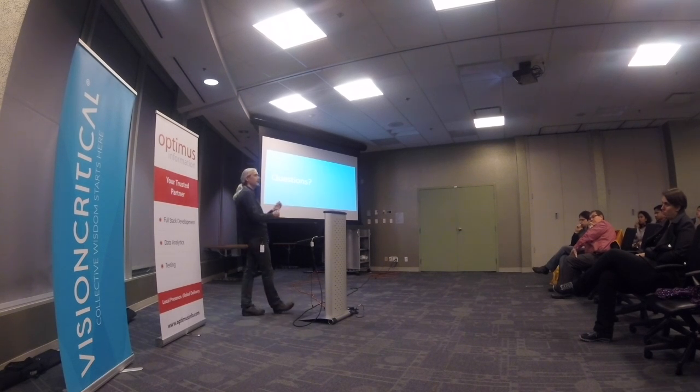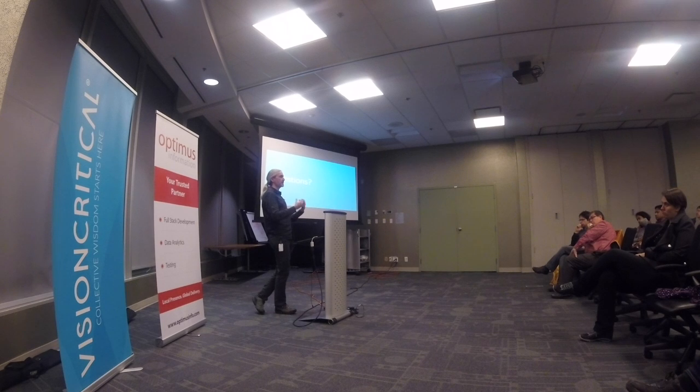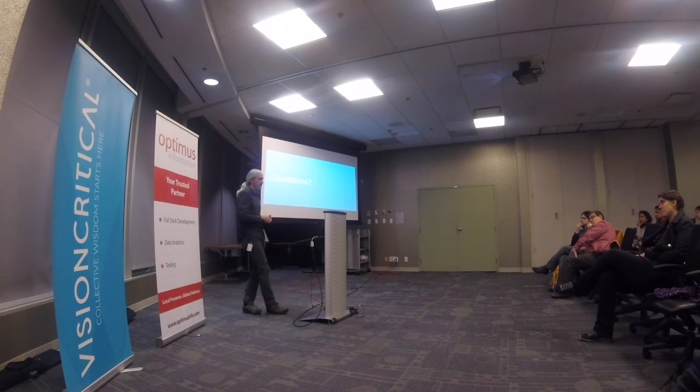Or you could pre-agree, almost like a contractual thing with your team, to say, can we define done as having covered the high and the mediums? Maybe that's the way you want to decide it. And then you have that flexible time, in the sense that you take as long as it takes to cover the high and the mediums before you say you're done. Then you release. That makes sense?